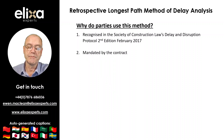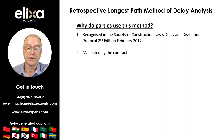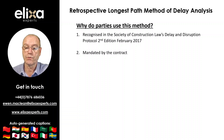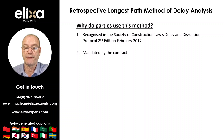Secondly, it might be mandated by the contract as the method for assessing delay, and as such a party may be obliged to use this method to assess delay. However, it is a retrospective method of analysis that requires the work to have been carried out to show actual critical delays, and so it is of less utilisation whilst the works are still being carried out.